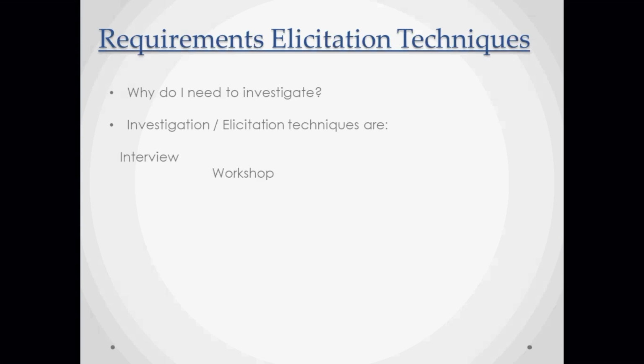The only time I would say you will need a workshop is when you are working on a project that involves multiple business functions. Maybe on that project, finance has a stake in it, facilities as well, HR, IT, different business units. When you have multiple business units, it may require that you use a workshop, because it may be difficult or time consuming to meet them one-to-one.